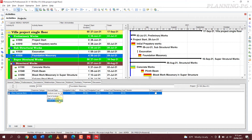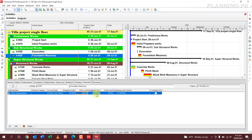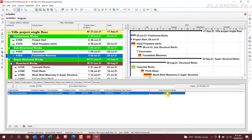For expenses, you can select the accrual type — such as 'Uniform Over Activity' — then enter the budgeted units (for example, 100), price per unit (for example, 10), and the budgeted cost will be calculated. You can also enter the actual cost — for example, one thousand dollars — and add a vendor name. There is also an option to auto-complete actuals.